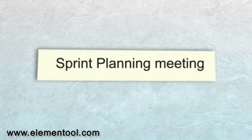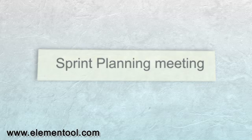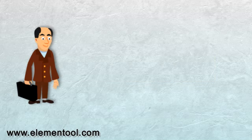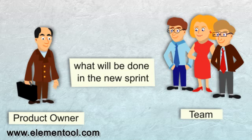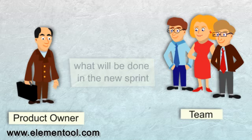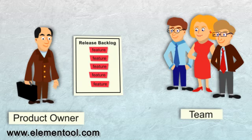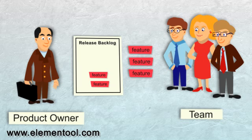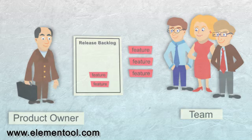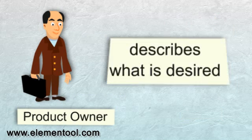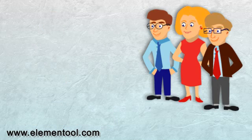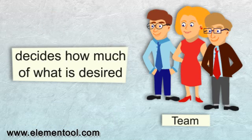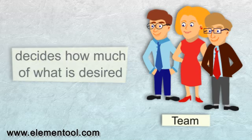At the beginning of each sprint, the team will have a sprint planning meeting. In this meeting, the Product Owner and the team get together to decide what will be done in the new sprint. They select items of the highest priority from the release backlog. The Product Owner describes to the team what is desired, and the team decides how much of what is desired they can complete in this sprint.